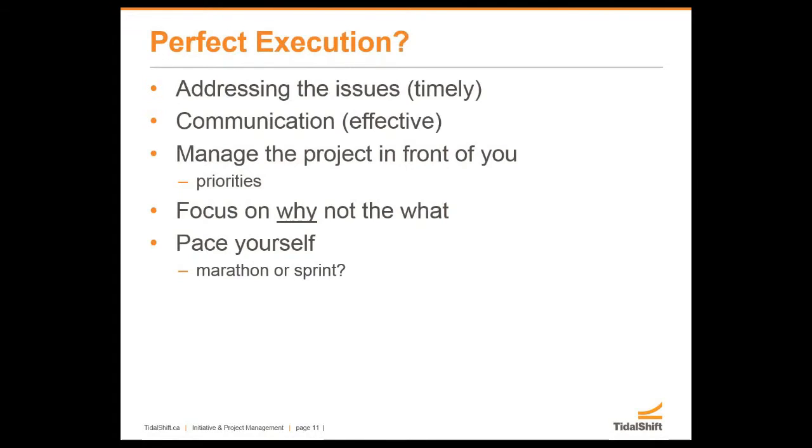Because if you can address those issues in a timely fashion, as I like to say, listen to the whispers, you don't have to hear the screams, then you can be far more effective. You can engage the team, you can bring the right people in place. And the one time they had to turn back, they were heading out to sea to go out on maneuvers, and a key piece of equipment on board was not operational. When he talked to the chief of that area and said, how long have you known about this? The answer came back a very sheepish 2 weeks.